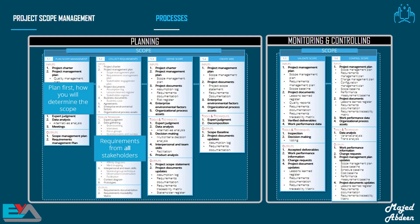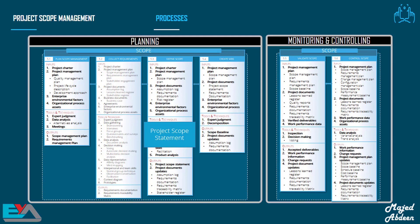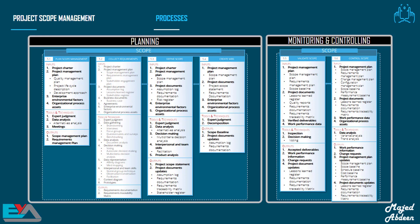You and the project team will gather the requirements from all the stakeholders involved in the project. We have to define the scope, which will produce the project scope statement. And we have the Create WBS process, which is the work breakdown structure, which we use in all projects. A WBS is a diagram which illustrates only the work you have to achieve or the deliverables for the project. We use this tool because it allows us to clarify the identified scope, as well as find additional scope.